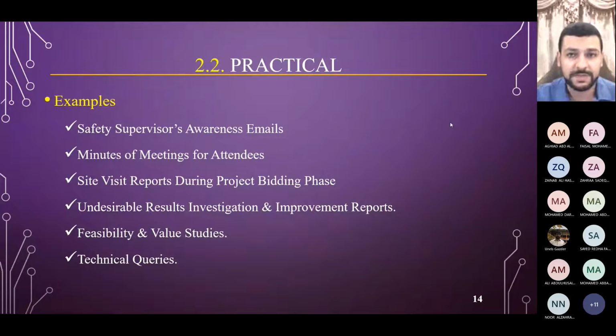Is it easy for the material and trucks to come pass by easily, or it's very difficult because it's either far away or the roads are very small, you cannot pass through? What are the advantages and disadvantages of the space? What are the nearby facilities, for example, supermarkets? They make a big difference if you have a supermarket, if you have a restaurant beside your job site. It's easier for the labor, anyone who wants to go and eat something, have a refreshment. It's easy, unlike the desert where you have to travel hours and hours just to buy a bottle of water.